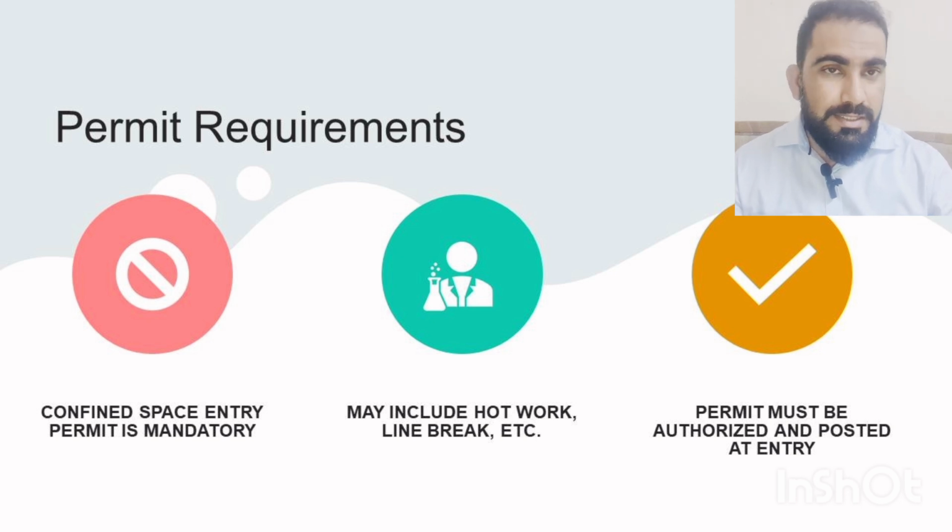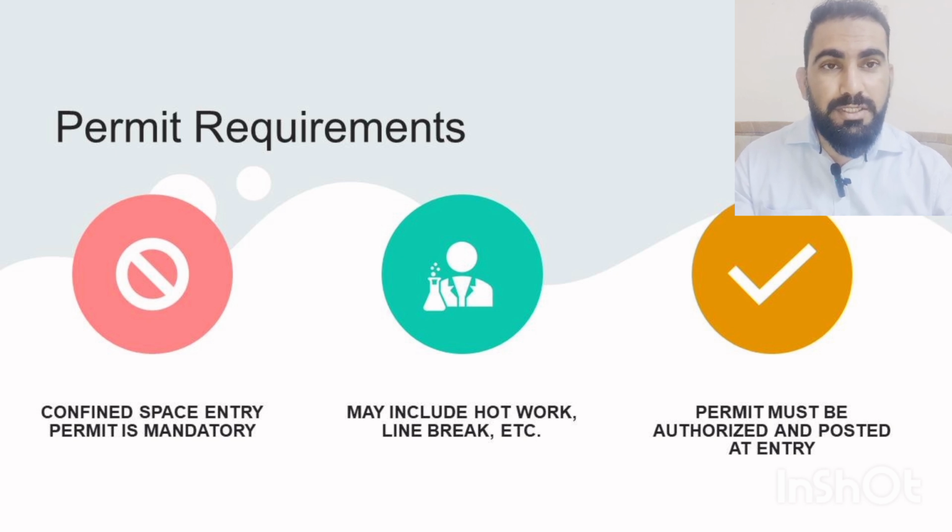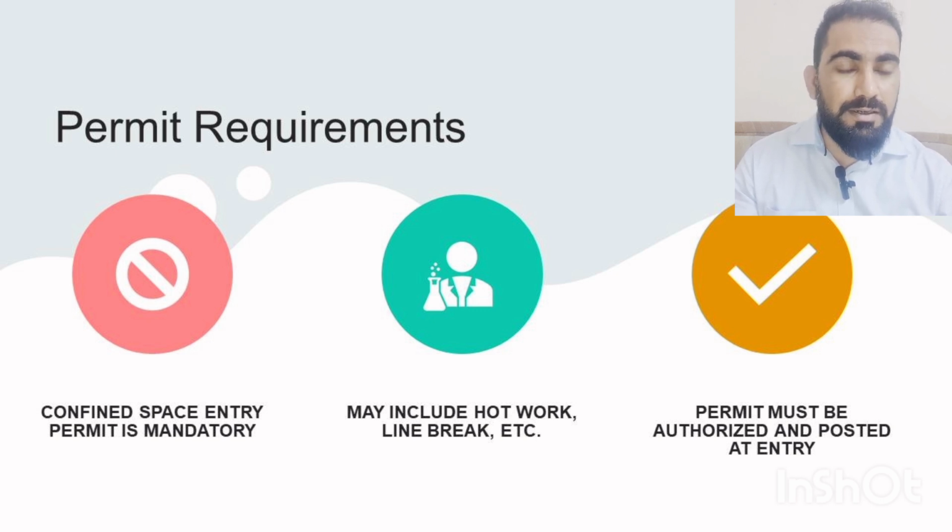Well, at step number 10 in the preparation of the confined space entry plan, you must mention the requirement of a work permit at the area. Before entering into the confined space, acquiring a work permit is very important, like the confined space entry permit, the hot work or the cold work. Before any work begins in the confined space, only a trained or competent person can receive the work permit from the Saudi Aramco work permit issuer.